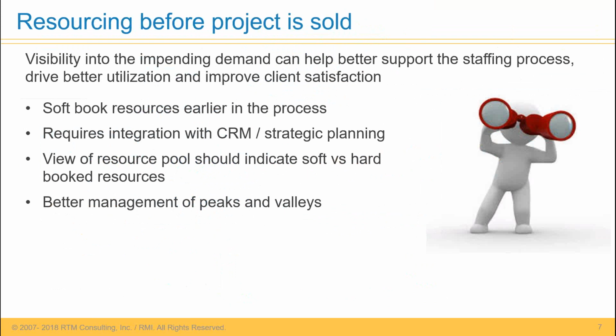The second item on the list is resourcing before a project is sold, or in the case of PPM, before the project is approved internally. And the idea here is to be proactive rather than reactive. So how many times do you get a request on a Wednesday, today's Wednesday, or Thursday, or heaven forbid, on Friday that says, I have a project starting on Monday and I need boots on the ground, and you're scrambling to find bodies? This is not a good situation. More often than not, it leads to delivery issues, client satisfaction issues, lower margins, all sorts of bad things.